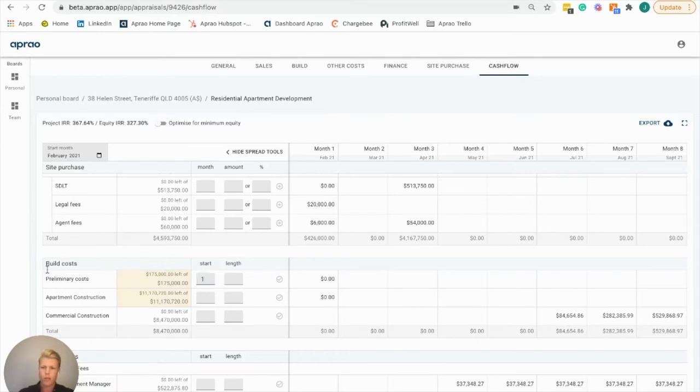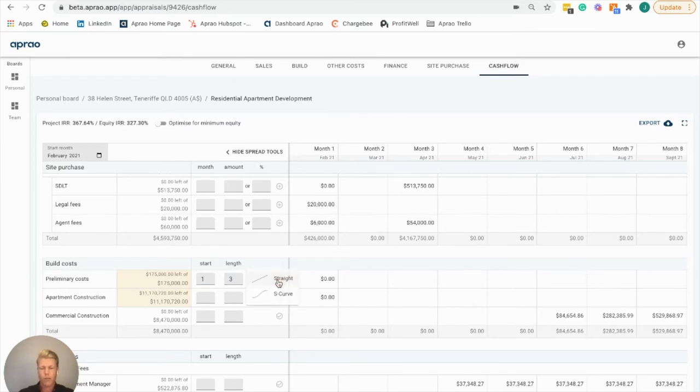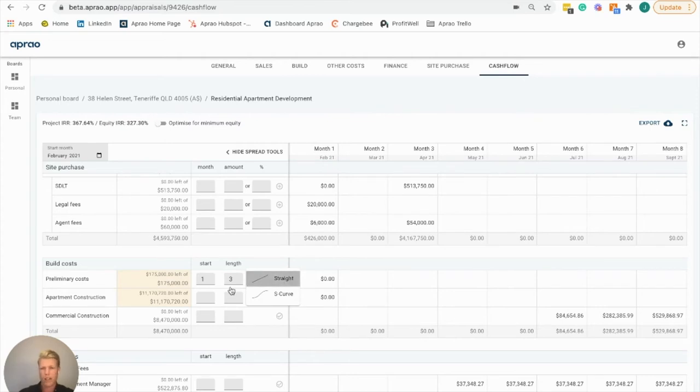In the build cost, we've got preliminary costs here. We're going to start that in month one, run it for three months, and as we hit apply, we can apply that in a straight line or s-curve method. We'll apply that in a straight line method for the preliminary costs.